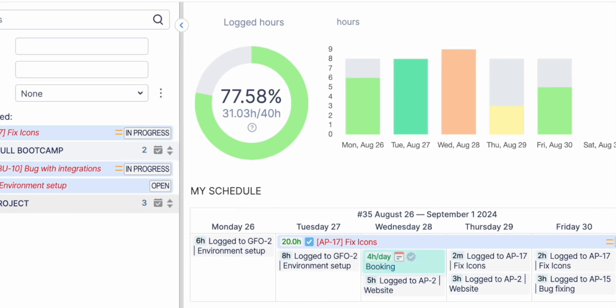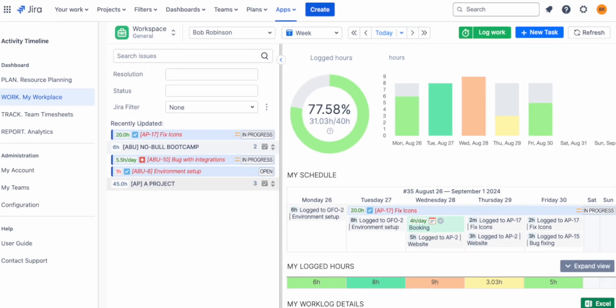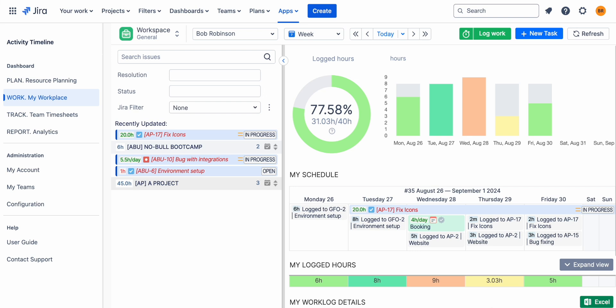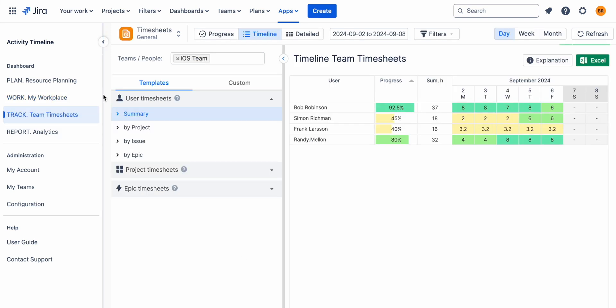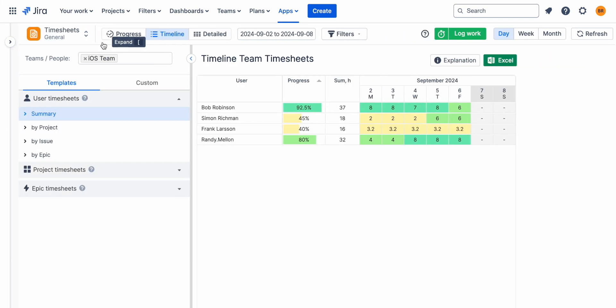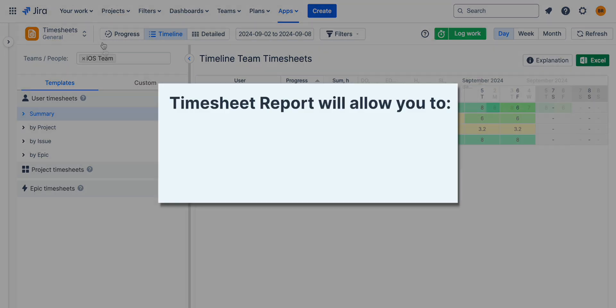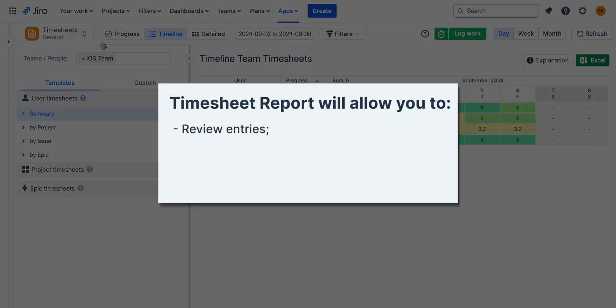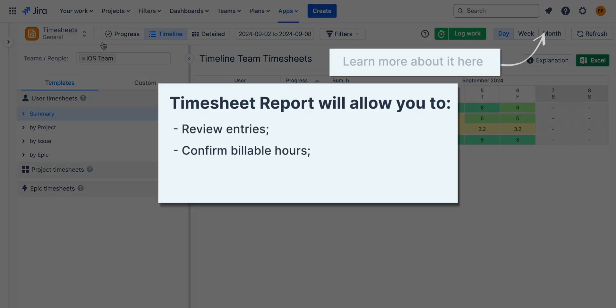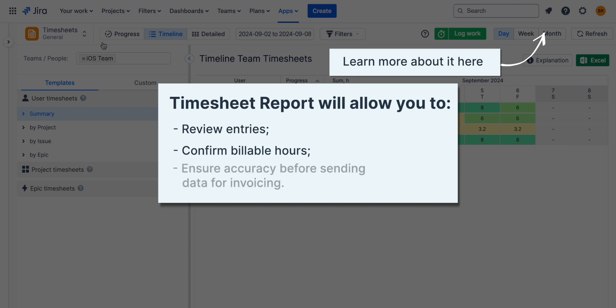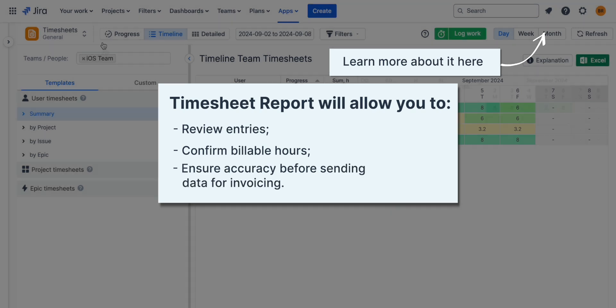If your organization requires timesheet approvals, enable Activity Timeline's approval workflow to streamline this process. Approve or reject timesheets through the timesheet report. It allows you to review entries, confirm billable hours, and ensure accuracy before sending data for invoicing.